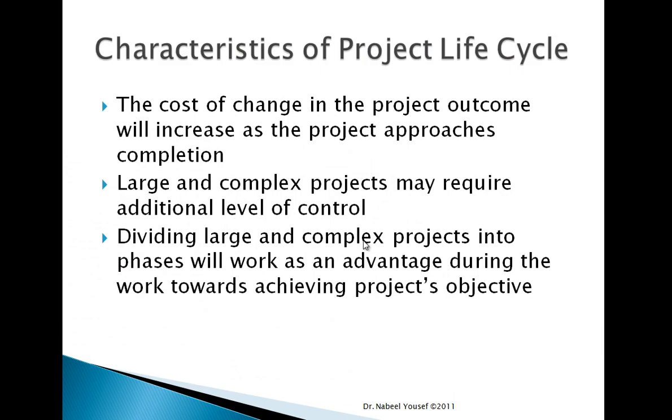If any change were to be performed at the beginning of the project, if the customer asks me to do some change, that will be easy to do at the beginning of the project, while it will get harder and harder to do that change as I approach project completion.